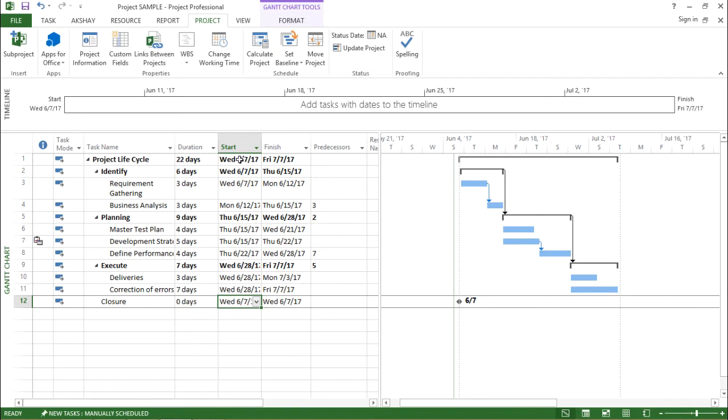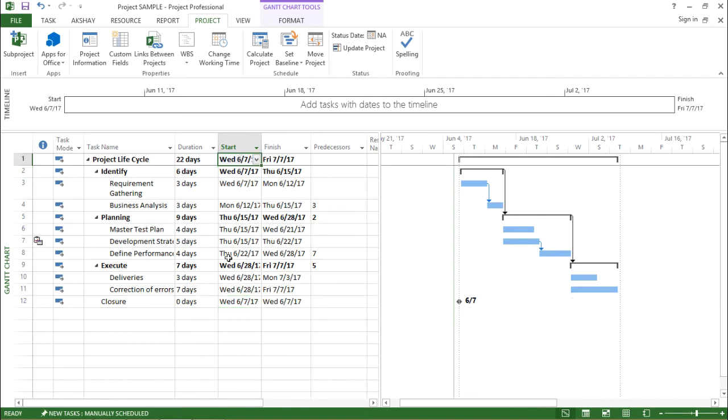As you can see, the start date has been shifted from Monday to Wednesday and subsequent changes can be seen in the rest of the task as well. So this was all about start date.